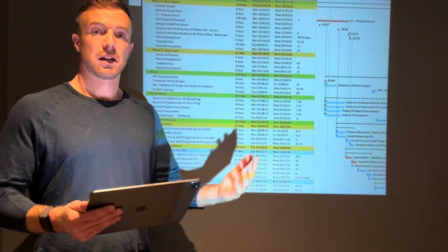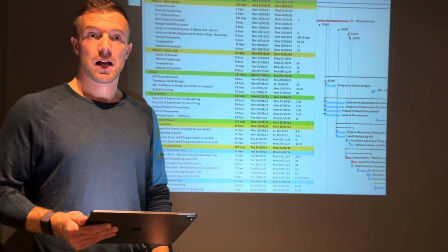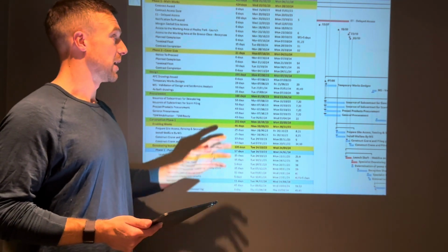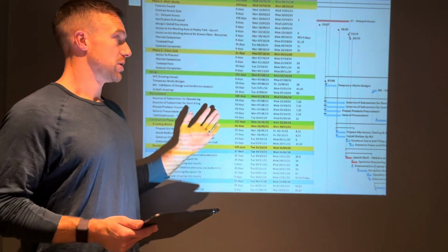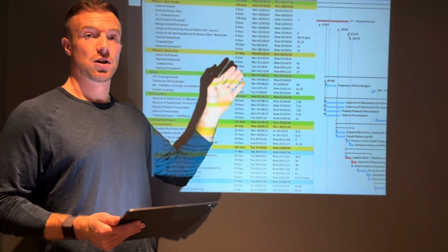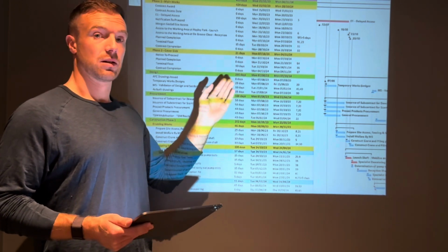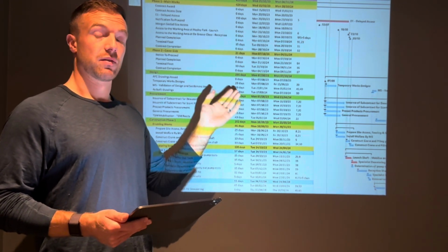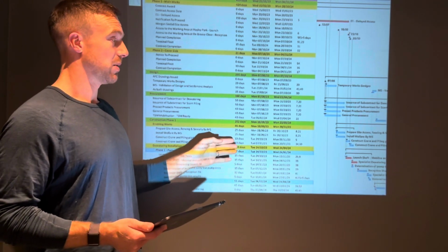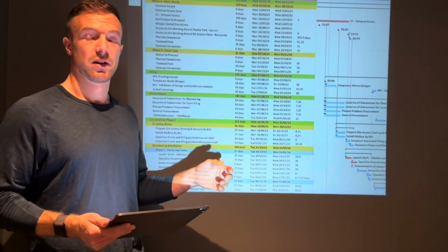So that's just a little example of how you can make it relatable to anything that you do. Effectively, it's just setting out each task and activity with a time duration, the dates by which you want to achieve it, and any activities which may have a knock-on effect. So you can't start an activity until the previous one's been completed, or maybe activities further down can be started when another one higher up is started, so you gain a bit of an advantage in that sense.